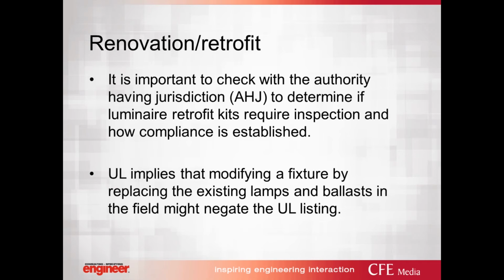So it's important to check with the authority having jurisdiction to determine if the luminaire retrofit kit requires inspection and how compliance is established. And I recommend that you do this at the design phase of a project. You don't want to wait until the inspector is out there inspecting and running into an issue.